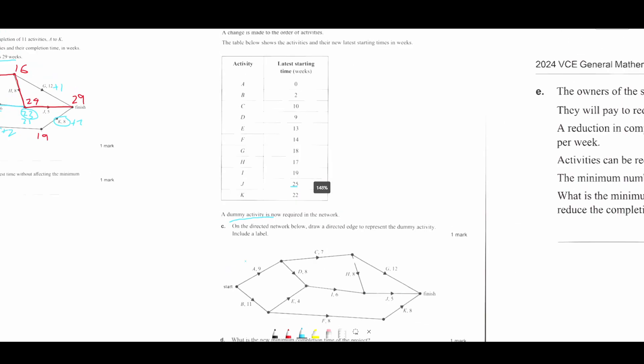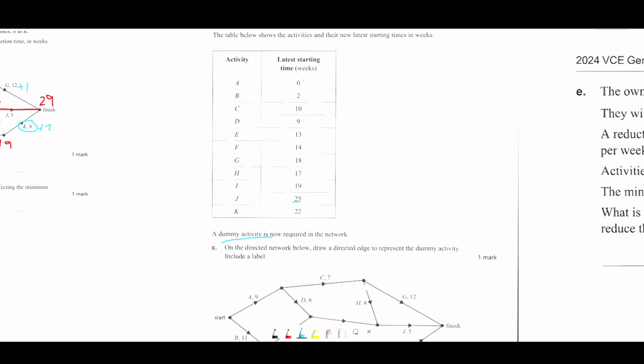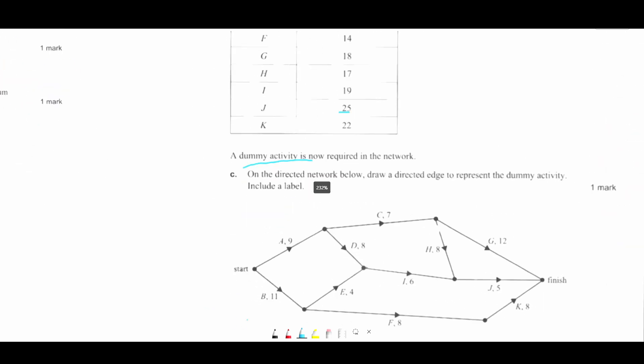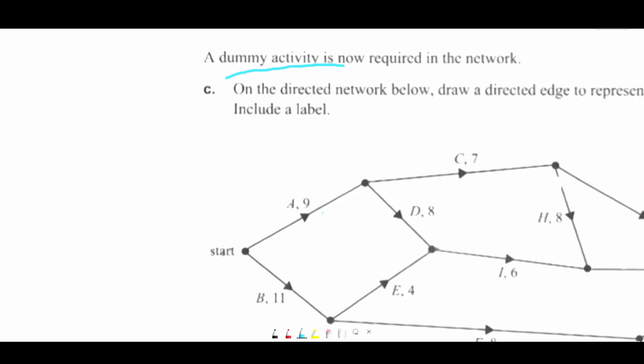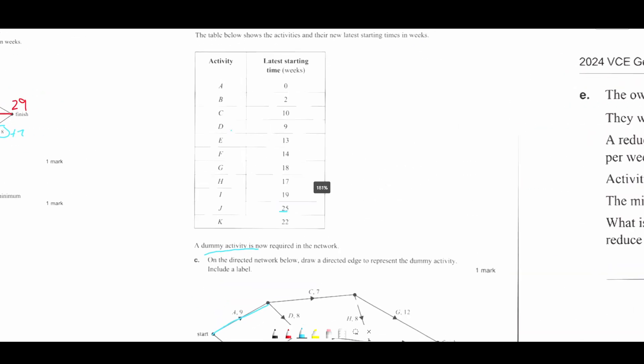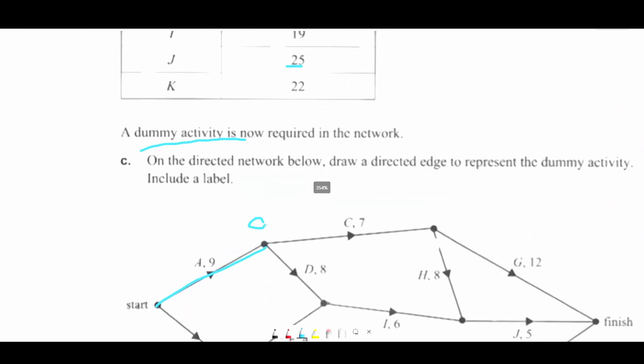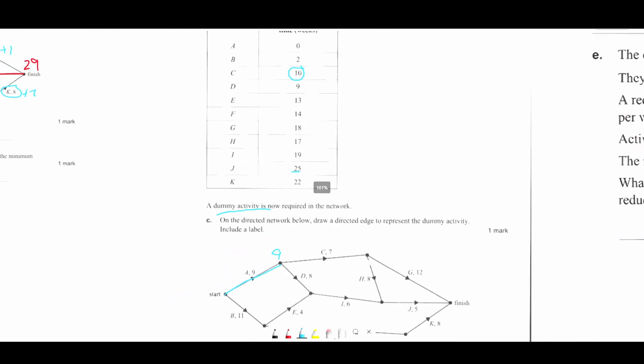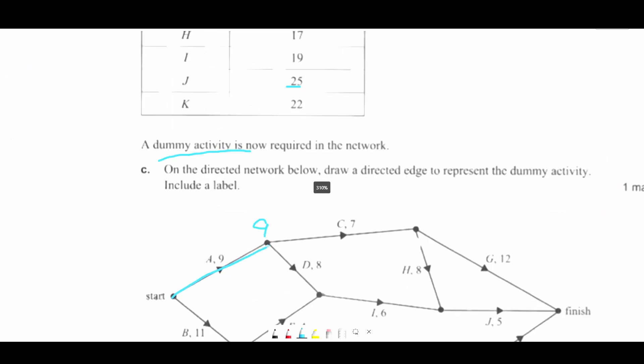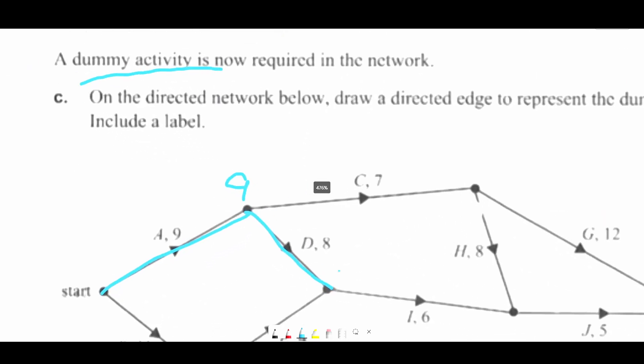So we can start chronologically. So the latest start time of 0 for A. That means A is on the critical path because there's only two options from the start, which is A or B. But A is 0 and B is 2. So the critical path is this way. And now it says C is 10. D is 9. So D is on the critical path. So 9 plus 8 is 17.